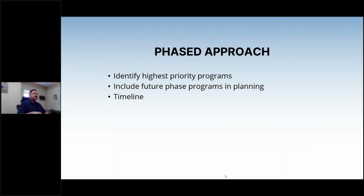The other thing that's important about the timeline, going back a couple of slides, is limiting scope creep. So we can say, yep, we can add that, but if we do, it's going to add 2 weeks, 3 weeks, a month to the go live. Is that something that we're willing to do? We usually counsel against it.